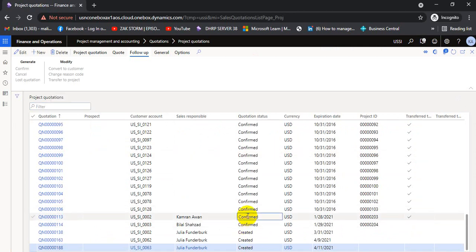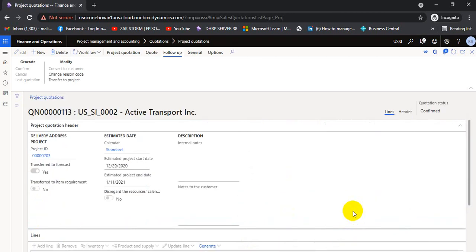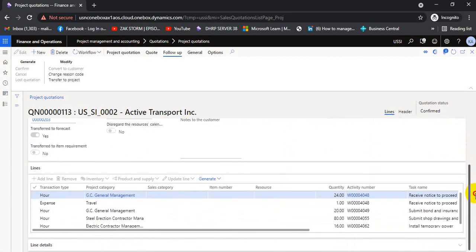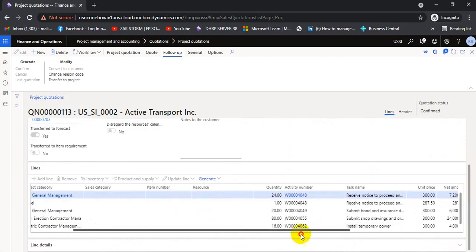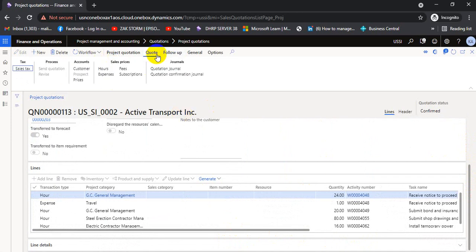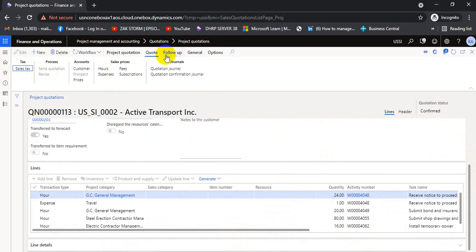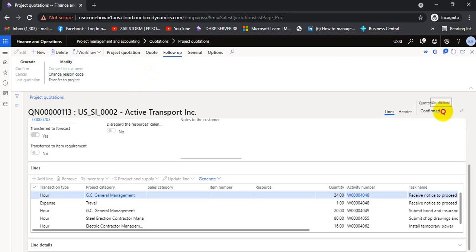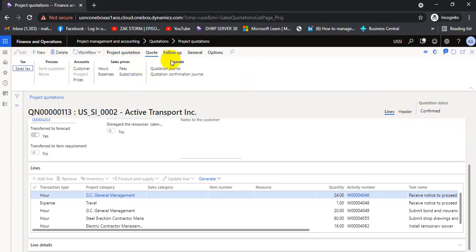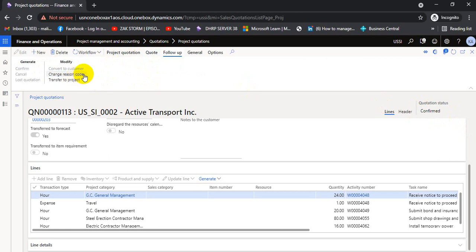Here we have a quotation in a revised confirmed status, and you can see there are some lines in the quotation. The status was already confirmed. After confirmation, we cannot revise it — we can only revise the quotation if it is at the sent stage. If it is confirmed, we cannot revise it; we have to move it to the project, or add a reason code explaining why the quotation is changed.